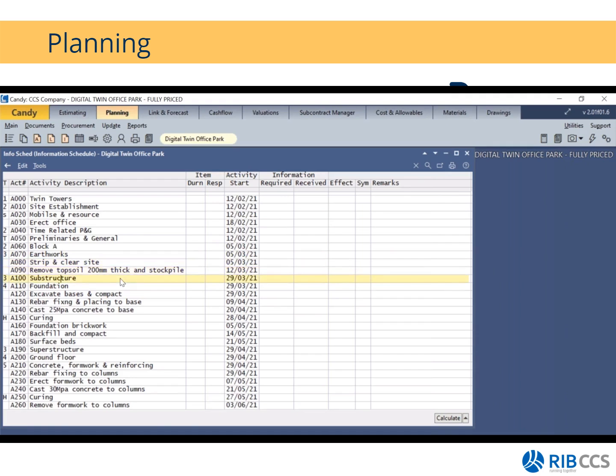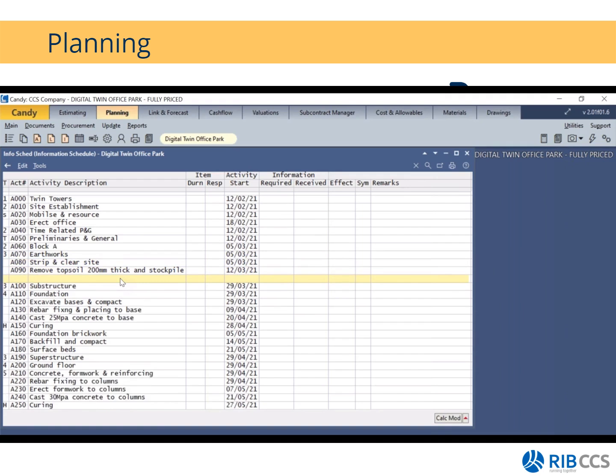So let's take removal of topsoil. As an example, I'm going to need general arrangements. And what this means is that after I have removed the topsoil, where am I going to dump it? Okay, so the engineer needs to tell me this, and I'm going to give him 10 days. He's responsible for it. And the minute I hit enter, I need to know what's going to happen by the 25th of February, right? So remember, this is taking into account non-working days and so forth.